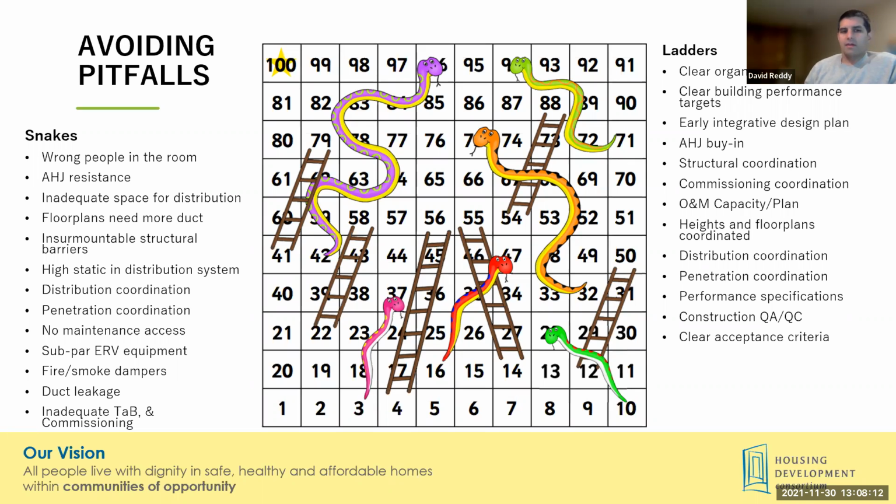the contractor was involved in pre-construction on most all of these, I believe all of them actually, and having that dialogue of where can these ducts fit, how big do they need to be, how much room do we need. Those are all coordination that needed to occur in order for these projects to be successful.